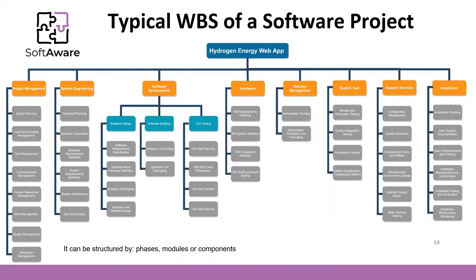The output of scope planning is a WBS — work breakdown structure. A work breakdown structure is a hierarchical description of the work that has to be done to complete the project. The leaf and final level of a WBS is a work package: the lowest level task when assigned the time, cost, necessary resources — people and material — and individual responsibility for their accomplishment.